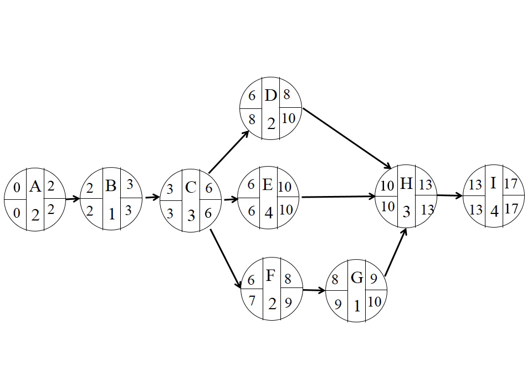Now next we want to figure out, do you have any leeway for each task? Let's look at A. What is the earliest you can begin? Time 0. What is the latest you can begin? Time 0. You have absolutely no slack or no leeway. The same is true for B. No leeway. 2 minus 2, or you can do 3 minus 3, which is same as 0. The early finish and latest finish, the difference is 0, or early start and latest start, difference is 0. They will always be equal. Let's look at D.